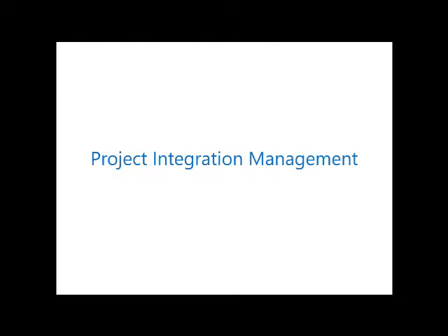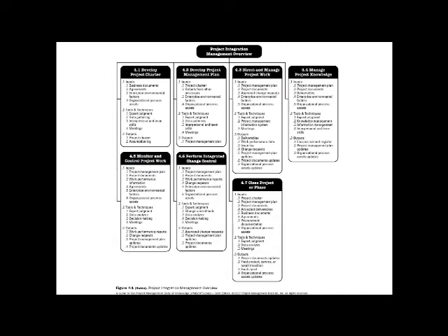So let's talk about each individual process. How has it changed? Project integration management. Let me show my little arrow. So as I mentioned, a new process, manage project knowledge, with the main output being the lessons learned register. Business documents are an input to develop project charter. No longer the confusing language of project statement of work and procurement statement of work. So project statement of work is gone. Procurement statement of work is still there.